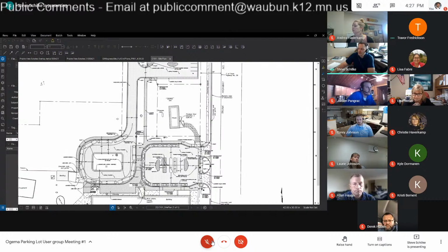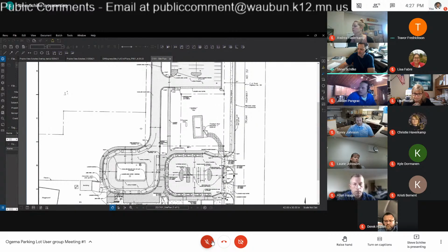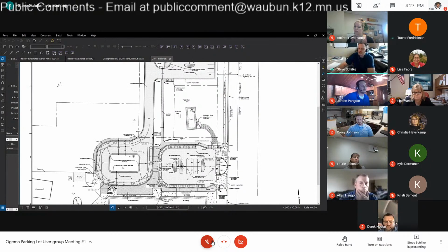But one thing you can take a look at too is if we fill this in with pavement, maybe this area over here that's gravel could be turned to grass, and now you've got the ability to deduct this from what you're adding, because the only thing they look at is a net increase. So we might have that. That should help us out when this gets filled in. But we'll run the numbers and verify that, so that we know in the future when you pave that you're not going to have any issues with stormwater quality.